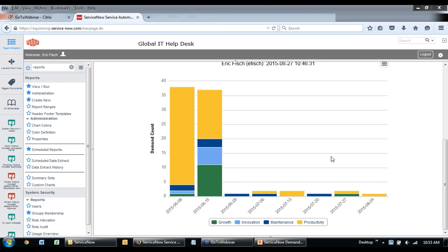We have some backdoor capabilities of still doing it manually in the cases where, let's say there was a project that we've had in flight for a long time, we haven't been tracking it in ServiceNow, but we know that we want to make sure that we get a record created. So we have ways of creating those without going through demand management. But the idea is that anything new that we're going to start execution on from a project management perspective, we should go through demand management first, and there's no other option. We need to have a business case, and we have to go through our prioritization cycle.